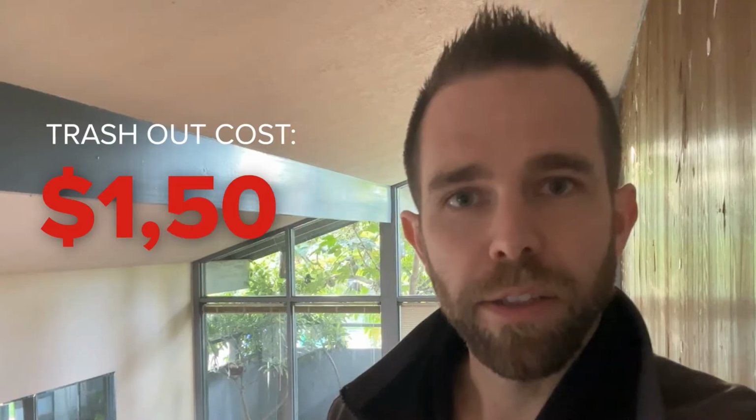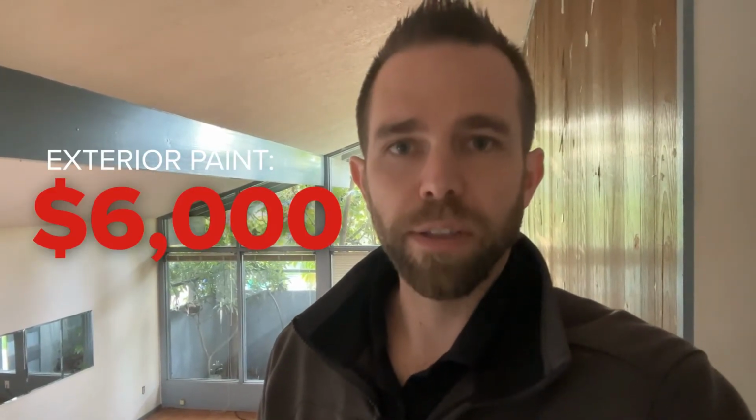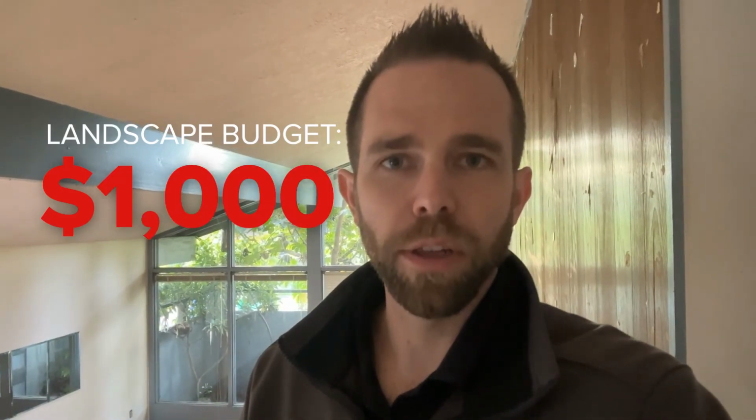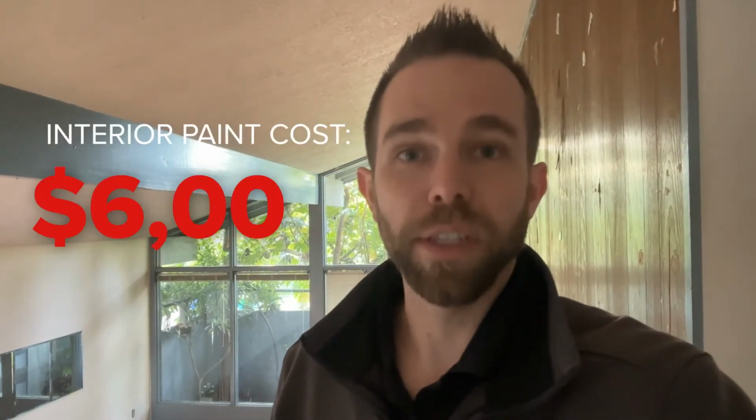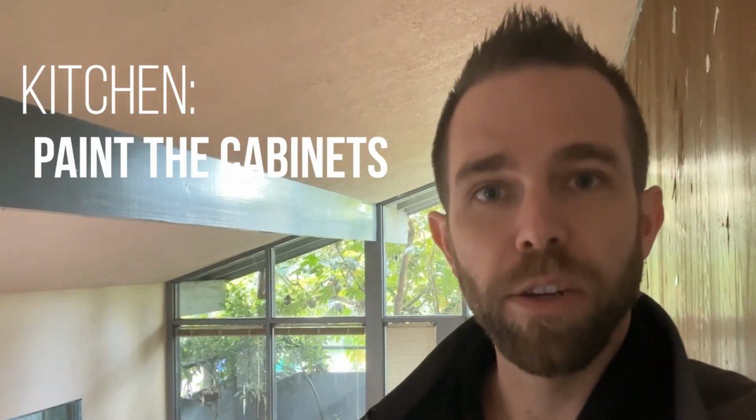Well, for starters, we already had to do a trash out and that cost us $1,500. We're gonna need to do exterior paint and that should run us around $6,000. In addition, on the exterior work, we'll also have to do some landscaping, and that's a pretty small budget, so I'm gonna allocate $1,000 to the landscape budget. We're also gonna need to do interior paint, and that's gonna be walls, ceiling, and trim. That'll be another $6,000.